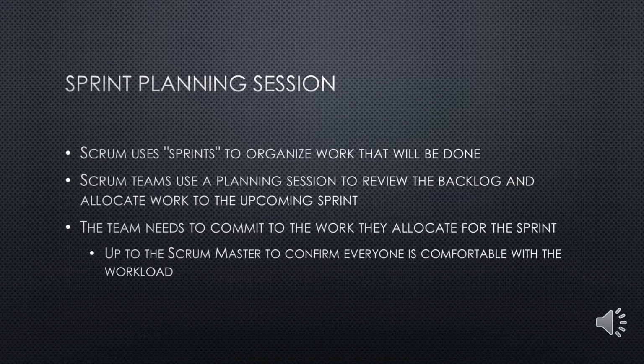The user stories can have points associated with them, so that the team can estimate how many stories they will be able to accomplish. The Scrum Master oversees facilitating communication between the team and makes sure that the team is comfortable with taking on the stories they selected. Team members must be open to communicating their concerns and comments about the work they are agreeing to. This planning session is vital as it will determine what the team will work on for the following sprint.